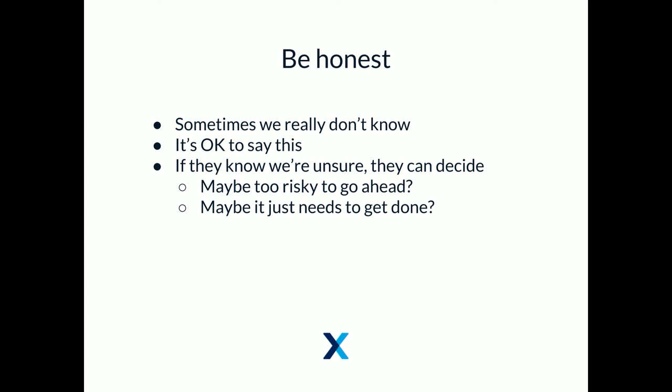Again, as I said, with the developers, it's really important to just be honest. Sometimes we really don't know how long something's going to take, and it's totally fine to say this. If you don't have that kind of relationship with your client where you can admit that it's something you're not familiar with, that's probably a sign of some other problem. So if we're unsure, it's up to them to decide. Maybe they'll approve a small amount of time to do some investigation, or maybe they'll say, you know what, it's not that important, don't worry about it.